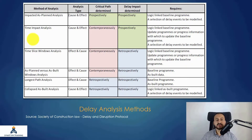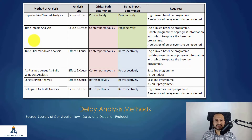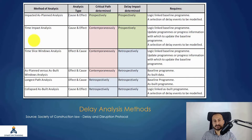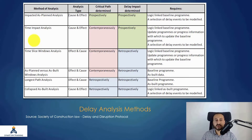Bottom line: there is no right or wrong in the delay analysis method. People are proactive in trying to provide best practices, but there is nothing required by law. We have practices and standards, but nothing required in court specifying that it must be done a particular way. Delay analysis is still evolving — I have seen people using Time Impact Analysis but making their own changes for various reasons.